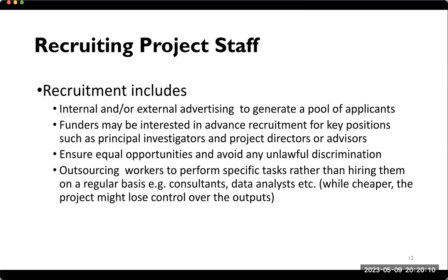There are some key positions that will be described in the request for application. And for those key positions, a funder might have a say on who you are bringing on board. But again, this will depend on a case by case basis. So it will depend on the project. If the project has a lot of monitoring and evaluation, then the funders might propose the M&E advisor or director to be recruited as a key position.